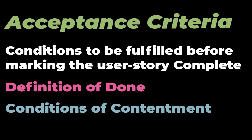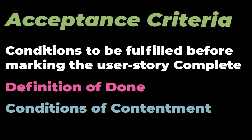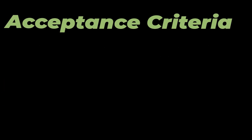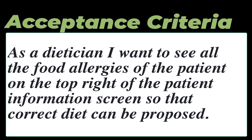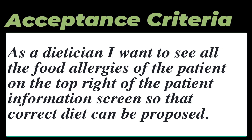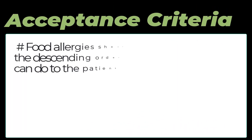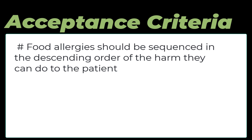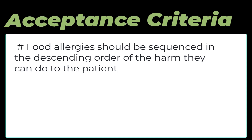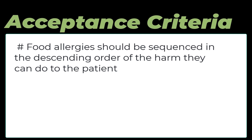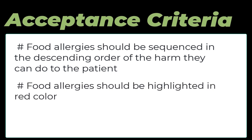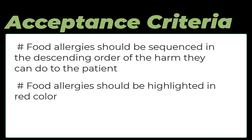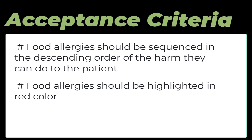Confirmation or acceptance criteria should always be a part of a user story. Looking into the previous example, the possible acceptance criteria for this user story could be: firstly, the food allergies should be sequenced in a descending order of the harm they can do to the patient; second, the food allergies should be highlighted in red color. And there can be many more.